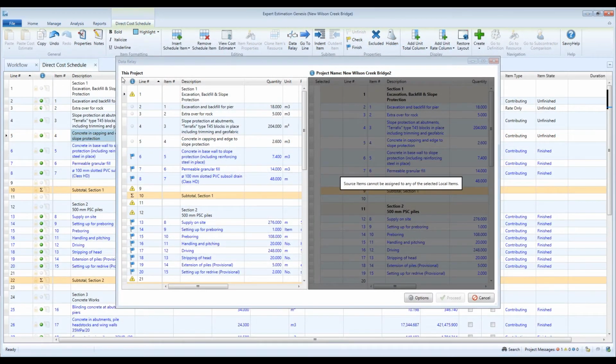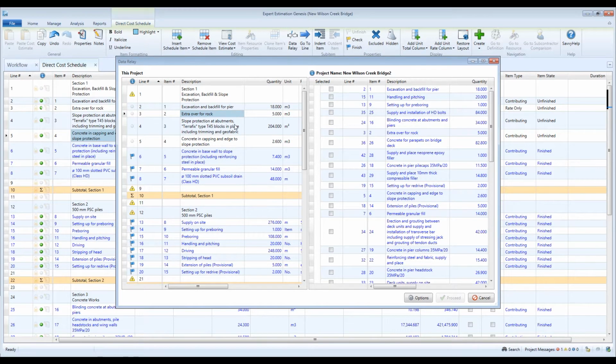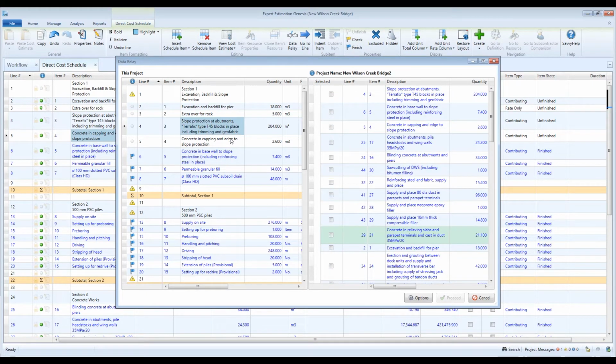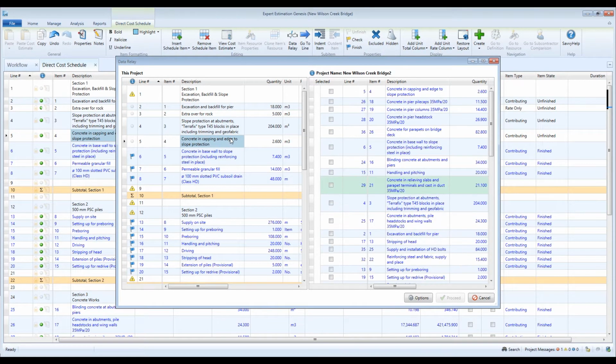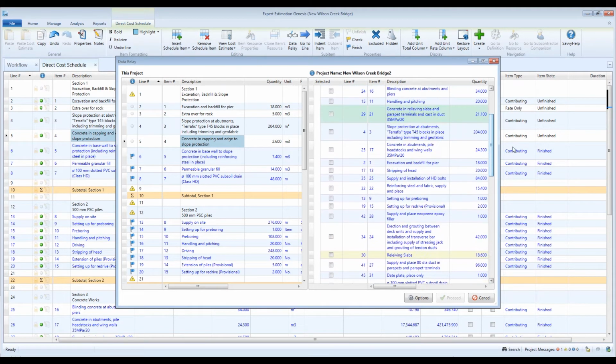To use the Data Relay tool, you need to have a project open and another project on the same server to work with. This is referred to as the source project and is where Data Relay will draw information from to populate your local project. This may be a template or a previous project that contains similar information to your current project. This feature can provide the most value when populating items that have been created in a new project, such as after the client schedule has been pasted in from Excel.